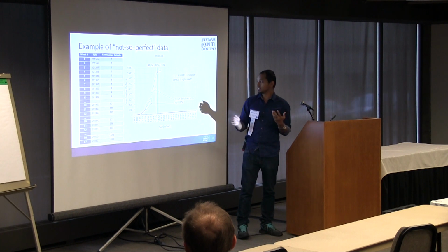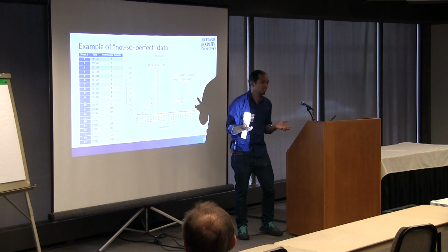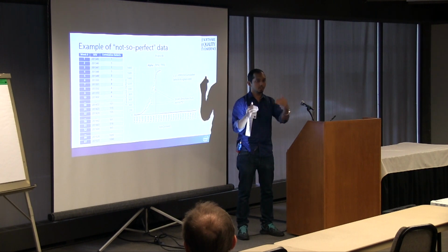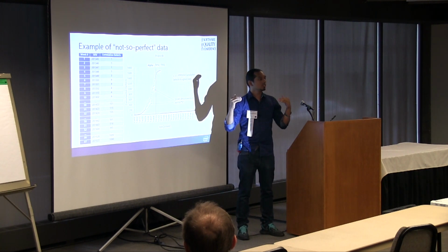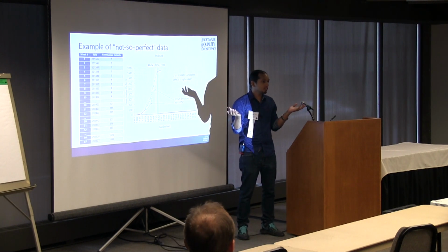So what I mean by that is we just took a normal S, but we know a lot of projects don't behave that way. For example, you have a Christmas break or a New Year. There are a lot of people going on vacations, and no one is going to test, no one is going to develop any code in that.